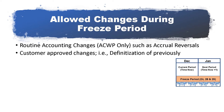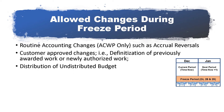In some circumstances, changes approved by the customer are made in the current period budgets. This may include negotiations of previously authorized effort that is definitized with a change in the contract value, but this also includes newly authorized work that must begin immediately. Undistributed Budget, or UB, is budget set aside for authorized scope which has not yet been distributed to control accounts. UB is considered a temporary holding account for scope and budget. As the baseline changes are authorized by the project manager, this scope and budget is transferred to the appropriate control account. These movements may take place within the freeze period.